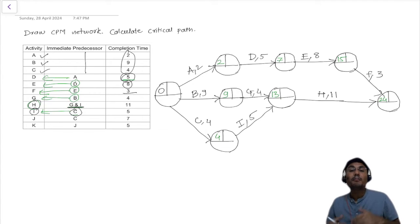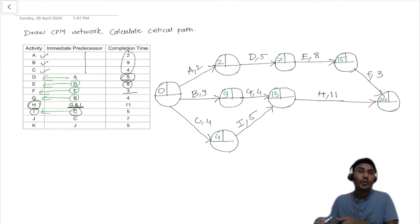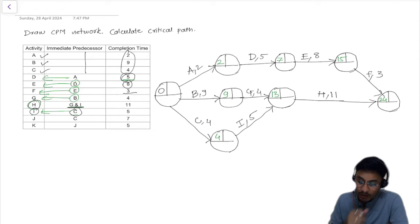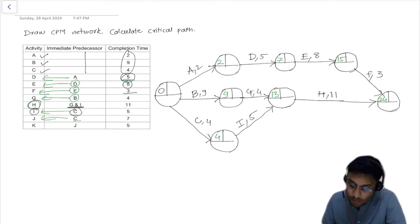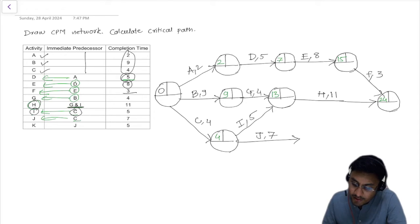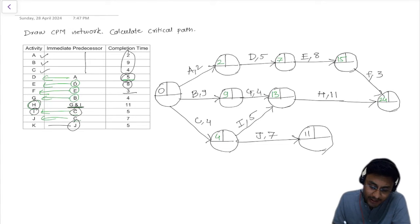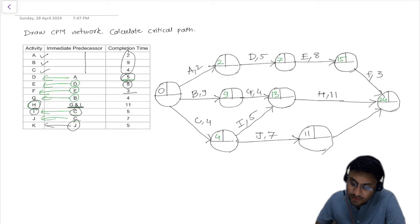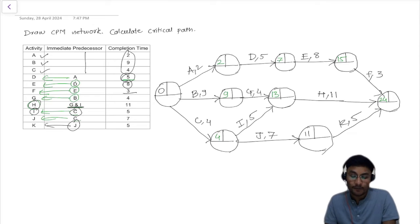The value of 15 plus 3 does not exceed 24, so that path is not the maximum. Moving further, once C activity completes, J activity will start with a duration of 7, giving 4 plus 7 which is 11. Once J activity finishes, K activity will start with a duration of 5 — 11 plus 5 is 16, which is also not more than 24. So this completes our network diagram.